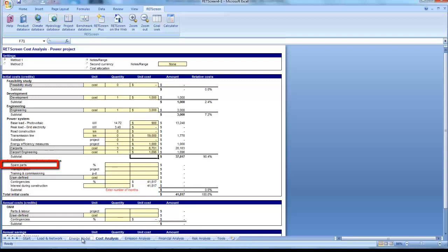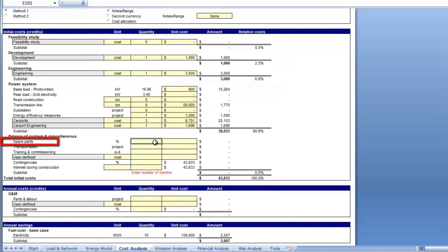The suppliers would need to be contacted in order to obtain prices or other information required for a more detailed feasibility study. For this project, one of the significant miscellaneous hardware costs would be for wires, but we have already included that in the transmission line costs. Since fixed array PV systems have no moving parts, spare parts are typically not needed as much as with other technologies. In the context of this project, we will only add $100 for additional screws and asphalt filler.